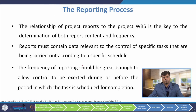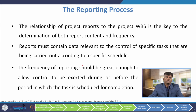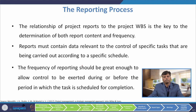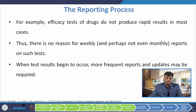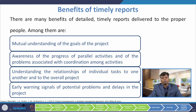The relationship of project reports to the Work Breakdown Structure is the key to determining both report content and frequency. Reports must contain data relevant to the control of specific tasks being carried out according to a specific schedule. The frequency of reporting should be great enough to allow control to be exerted during or before the period in which the task is scheduled for completion. For example, efficacy tests of drugs do not produce rapid results, so there is no reason for weekly or even monthly reports on such tests. When test results begin to occur, more frequent reports may be required.